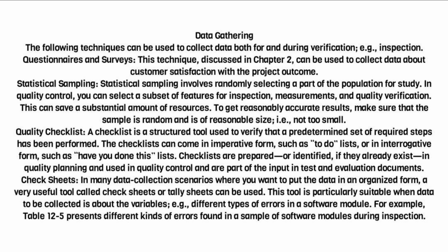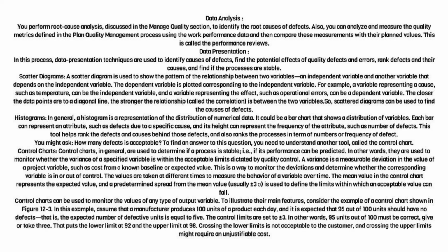Check sheets. In many data collection scenarios where you want to put the data in an organized form, a very useful tool called check sheets or tally sheets can be used. This tool is particularly suitable when data to be collected is about the variables, for example, different types of errors in a software module. For example, Table 12.5 presents different kinds of errors found in a sample of software modules during inspection. Data analysis. You perform root cause analysis, discussed in the Manage Quality section, to identify the root causes of